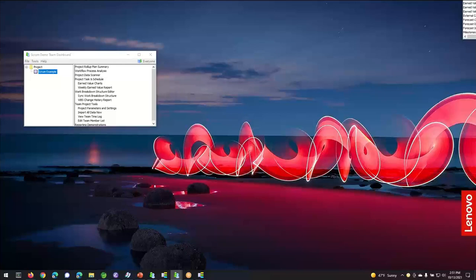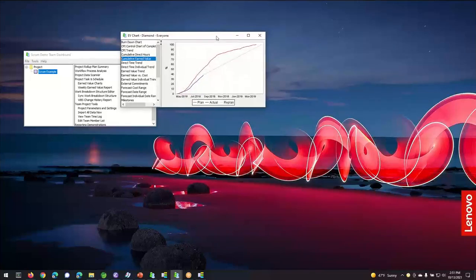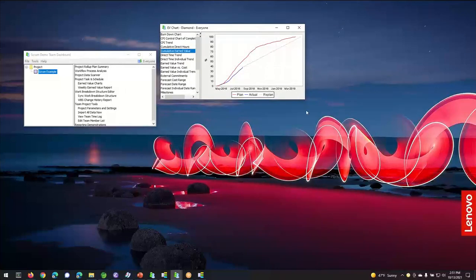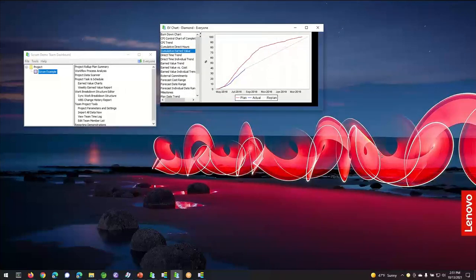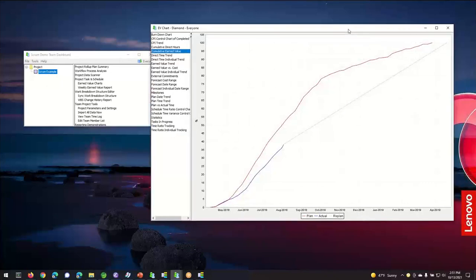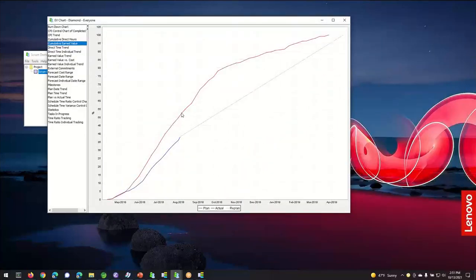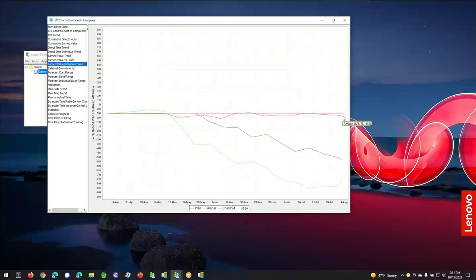This is an example of a large program that's been underway for some period of time. We can see that they have a plan for how long the work is going to take in this particular program increment. We can see that they're behind. This particular project is made up of 3 sub-projects. So if I drill down in, I'm going to see that of these 3 sub-projects, one of them, the Amber project, is on schedule, and the Chestnut and Sage projects are behind.